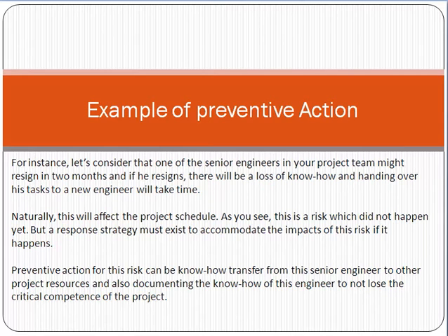of knowledge, and it will result in delays and issues in the project, because no one knows what the senior person knows, but he has the knowledge. So the issue will arise. This is very important: if you already know 2 months ahead that this senior resource will be resigning, it is very important to make a resource backup of that senior resource, and instruct that senior resource to deliver the know-how of the project to the other resource.